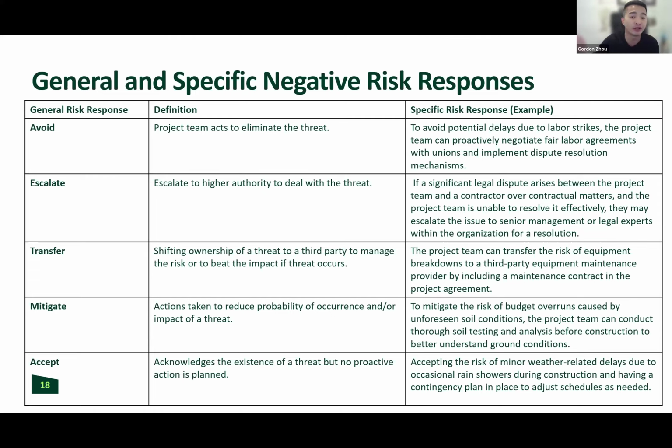Or you may say, I'm going to avoid that entirely because it's such a high impact, high probability risk. For the lower probability, lower impact risk, probability of 1, impact of 1, net score is a 1, super low, in the green zone. You may say, I don't have enough money. I'm spending a lot of time and effort and money on those higher priority risks. For those green risks, those low net score risks, I'm just going to accept. So that's where the responses and the risk assessments go hand in hand.